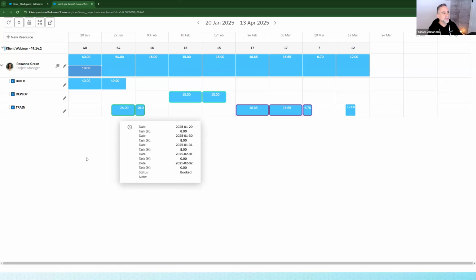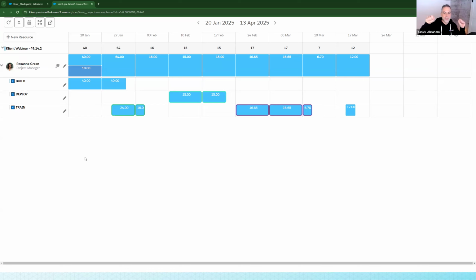So they're grouped, meaning that, as we will see in the next feature, you're going to be able to move them separately. And this way, it also helps you streamline your rescheduling, so you don't have to move one block at a time or change one block at a time. So that grouping is going to really help in terms of scheduling, even more so when it's a schedule that's not just spread across or distributed evenly. When you're creating your own schedule and there's some break in between your work on the same task, that grouping helps a lot for your team.